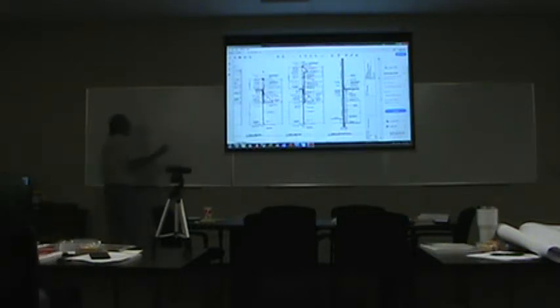Now, until I complete my sheathing, can I do flashing, masonry, or EIFS? No. So I'm going to drop out of this activity. I'm going to come back like this because of board space. And I got to do flashing. Okay? Once my flashing is in, I can then begin two activities, can't I? I can begin masonry, and I can begin brick. And if you analyze the time between those two, either masonry or EIFS will become my critical path, right?